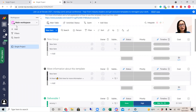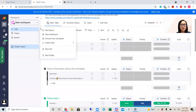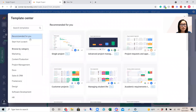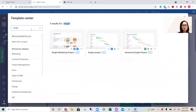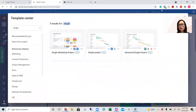So sign on to monday.com, then you want to — with Google or whatever you need — click workspace on the left hand side. Click 'add new board' if you want. I'm going to choose from templates, and then I click 'single project' and select this one.